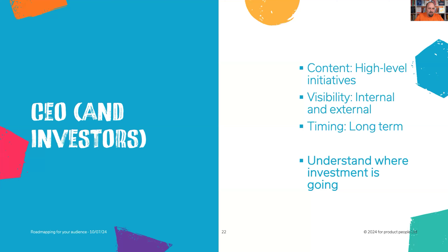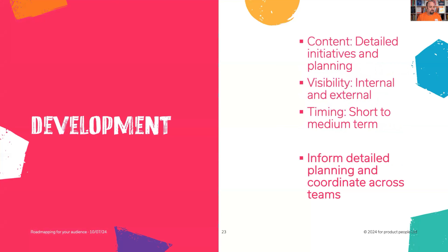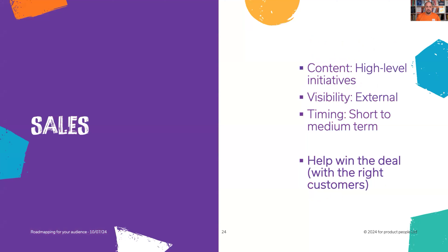Knowing that difference in expectation, they ended up with two artifacts. Development might care about something different: detailed initiatives and planning information, both internal and external, and a shorter time horizon — to inform detailed planning and coordinate across teams. Sales need high-level initiatives — too much detail puts you at risk in a contract. It's external only, relatively short to medium term, and it's about helping them win the right deals with the right customers: the ones that align with your direction of travel, not those going in a different direction.